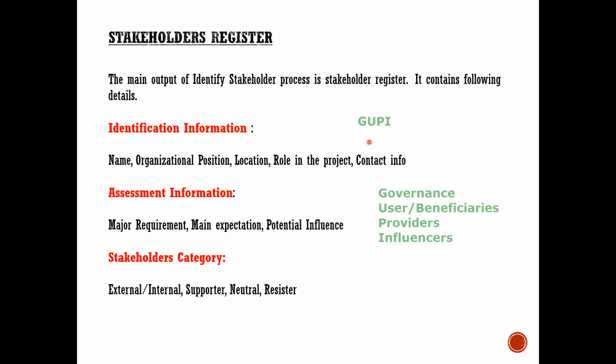But when we were about to execute the project, the villagers came out for a protest. They asked for compensation, because of which the project went over budget. In fact, they asked for compensation multiple times, because of which the project was over budget and timelines slipped. This is what he said as an example.